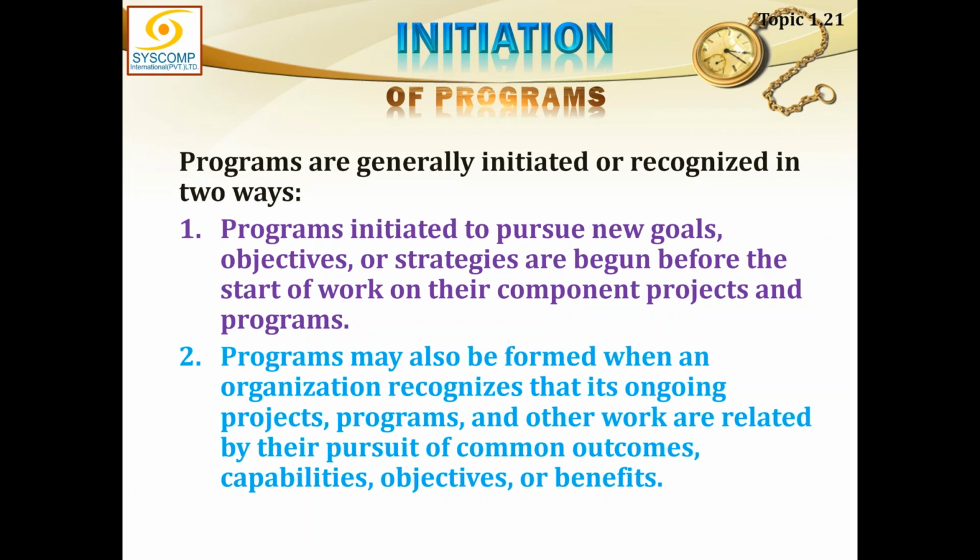The second approach is there are already existing independent standalone projects or programs or other work, and you realize that if they can be put together, they can be coordinated, they can yield the benefits in a more synergetic manner. So existing projects, programs, or other work are joined together and redesigned to form into a program.